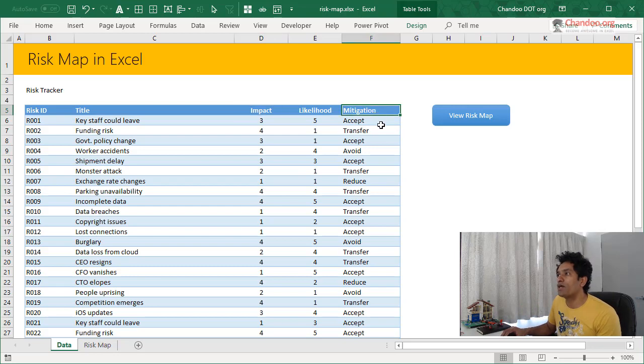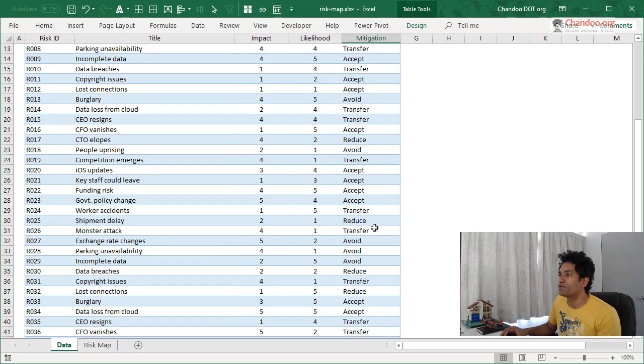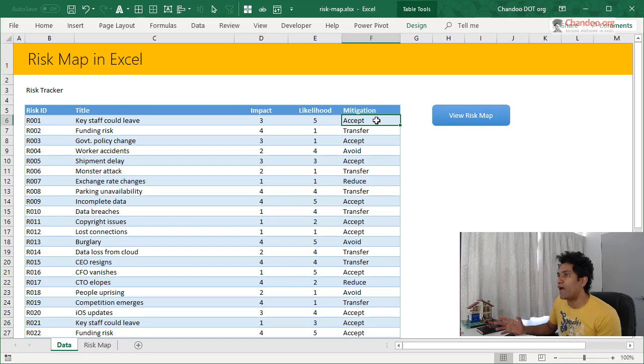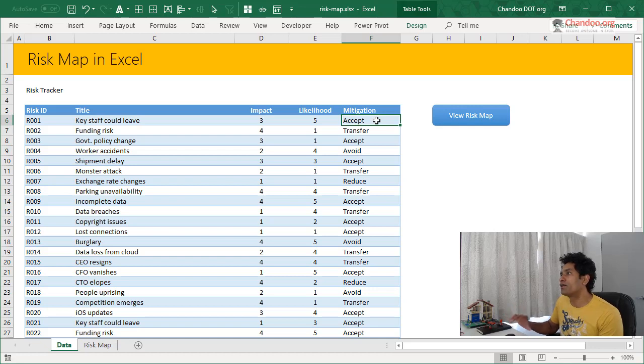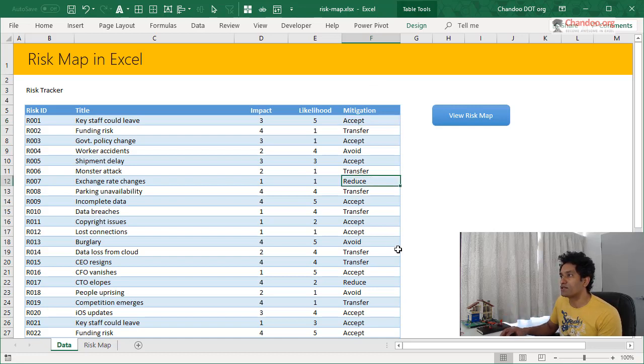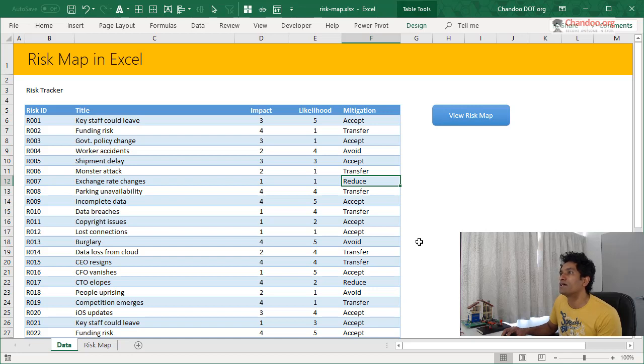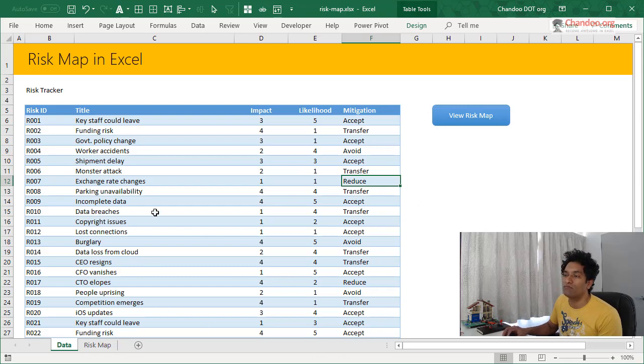You could also have a mitigation strategy assigned to each of the risks, usually mitigation of the risk falls into one of the four categories, which is you accept the risk, you avoid the risk, or you transfer the risk to somewhere else. Altogether, you reduce the risks. Those are the four different options. And then you could also have additional columns here. For example, who is the stakeholder or the person responsible for managing that risk? And you could add that as a column.